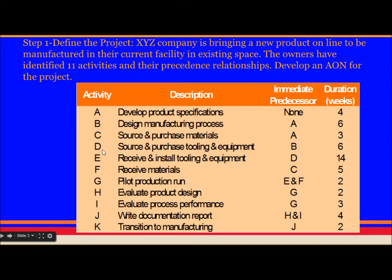This is the activity. This is the description what we are going to do in that activity. And this is the immediate predecessor. Which means that activity A can start anytime and has duration of 4 weeks. Activity B can only start when A has completed. Activity C can only start after A has completed. Similarly all these things.